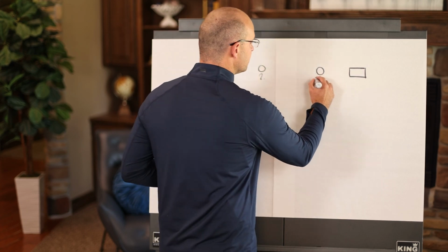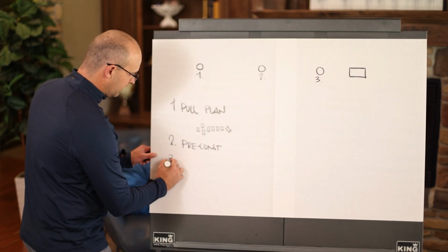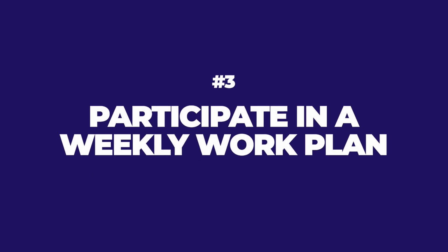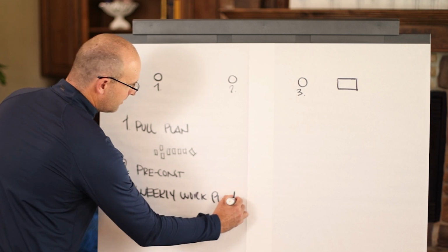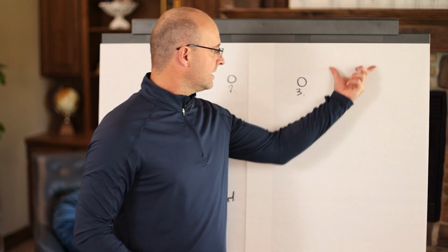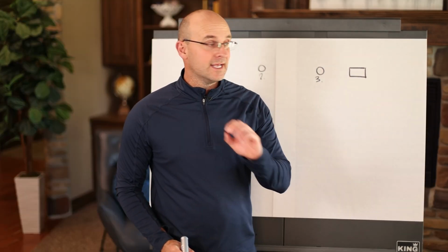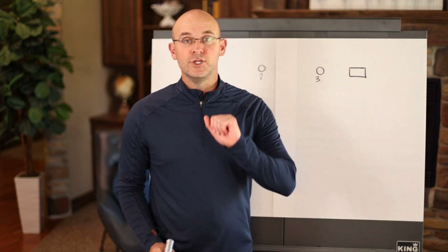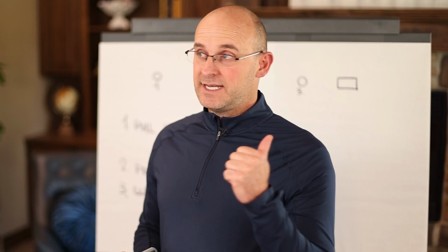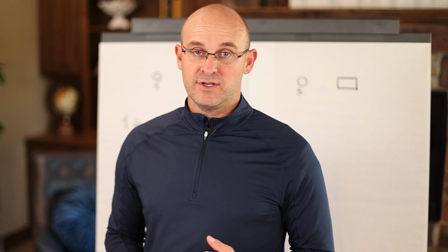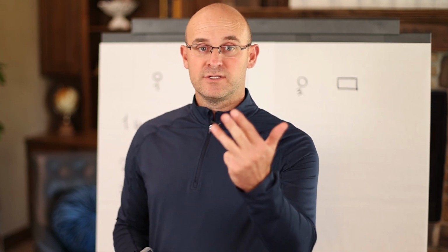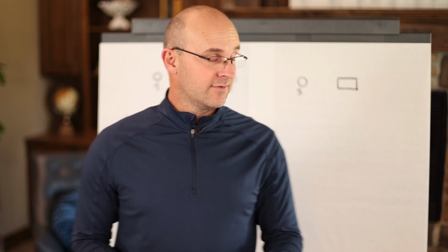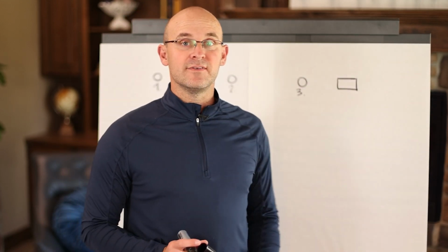You will participate with the project team in what's called a weekly work plan. And that weekly work plan is where you and the other trade partners coordinate the detailed aspects of the start and end date for your activities so that you can commit. You're basically saying, in addition to the look-ahead planning that we've done, I have the labor, I have the materials, I have the information, the layout, the permissions, I have everything, and I can complete my activity on that date.